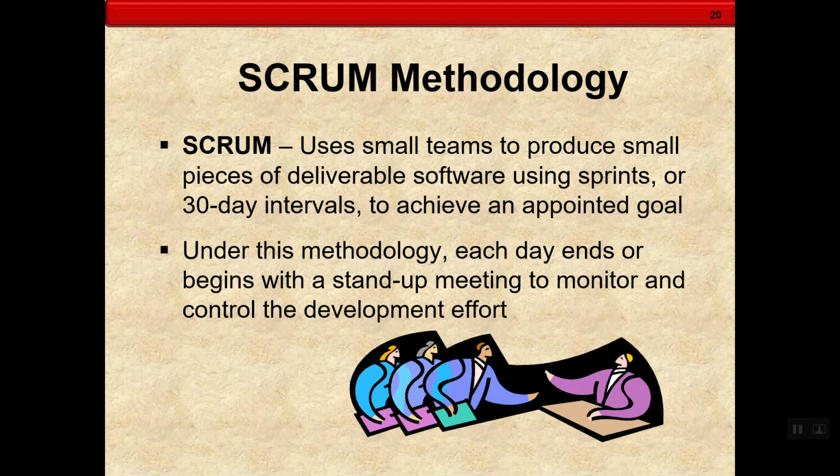And they call it 30 days, but it could be shorter than that. It could be whatever the team would design. So the idea is that there's very heavy engagement between both the development teams and the business users, kind of a formalized approach where each day will begin and end with a meeting, to kind of define what's going to happen over the day. You get to the end of the day and review what was completed and set up for the next day. So it's kind of a repeat, over and over again.